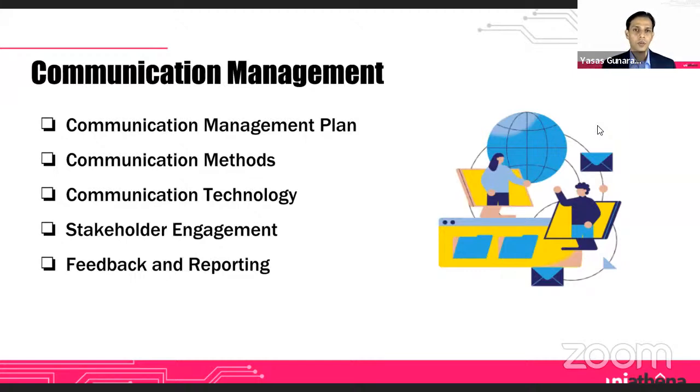Okay. So coming back to the topic, communication management. To manage your communication well, you need to have a communication management plan, and good project managers would know how it would work. They would clearly define what are the main tools, what are the main methods that we would communicate with the team. For an example, they would say, okay, we will use email for official purpose. And your plan would define that.